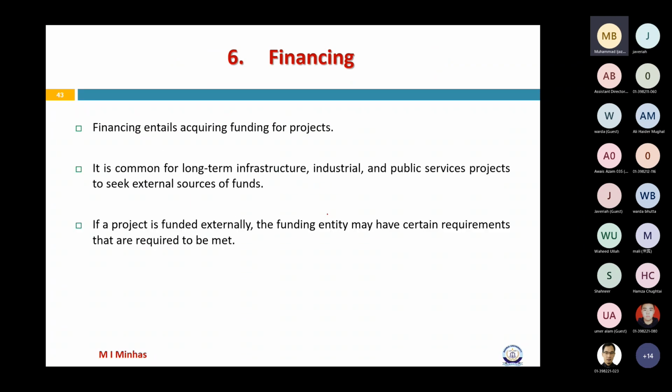Now, financing. You might need to know the funds that we require during a particular period, and what would be my sources of financing for that, from where I'm going to get those funds. It is common for a long-term infrastructure, industry, or public service project to seek external sources of funds.